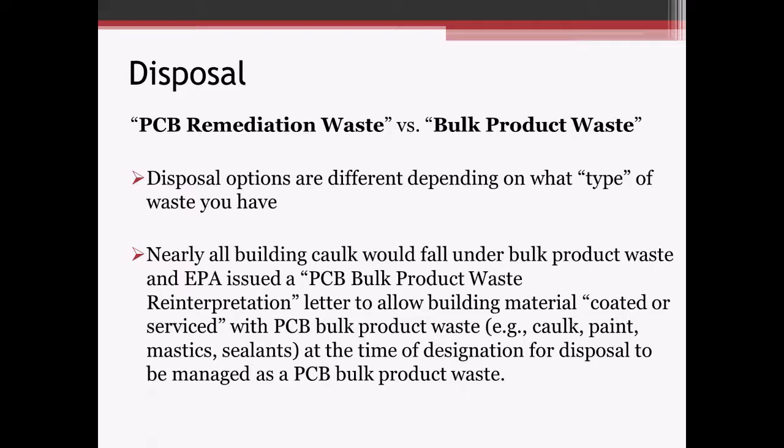Just one thing to note here on the disposal side of things, PCB remediation waste versus bulk product waste. There are different criteria for those, depending on the type of waste you have. The EPA did issue a clarification or a letter out there that allows for building materials to be expanded into the PCB bulk product waste, which allows for easier disposal. It's not easy to dispose of to begin with, but easier disposal on those types of waste as a bulk product rather than a remediation waste.